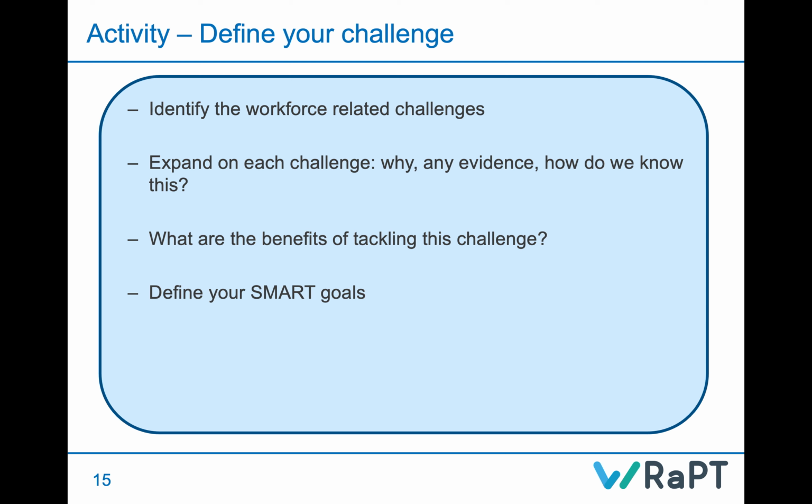So thinking about it in a single sentence, can you define that we are looking to redesign MSK services to ensure, let's say, better access for patients. Specifically, we need to define what better means in terms of 95% of patients are able to be seen within 10 miles of their house. Let's define it that way. That's what we want to see coming out of this, and we want that to happen by 2025 or whatever.